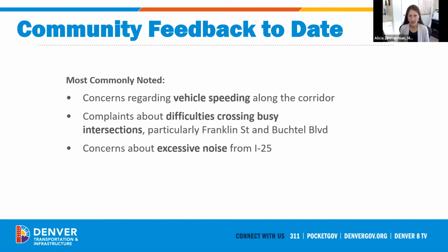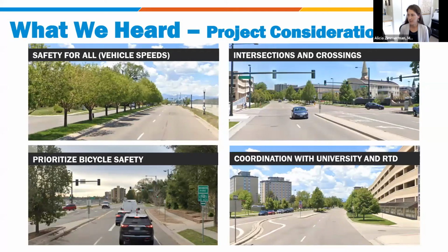So they've been heard and they are being discussed and routed through Dottie, but they are outside of the scope of this specific project, because this specific project, as Ashley mentioned, was able to be funded and constructed because of repaving that was already going to happen between the curb faces this year. So certainly not forgotten about at all.